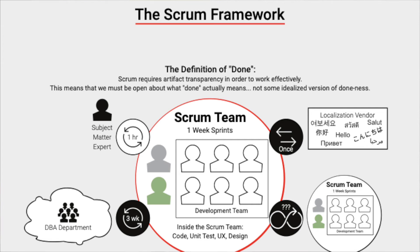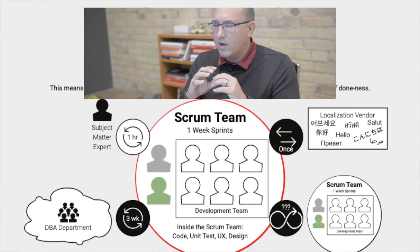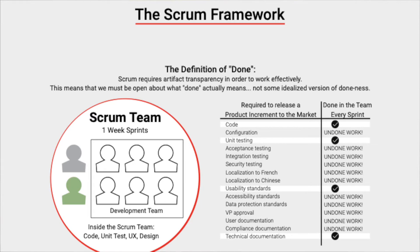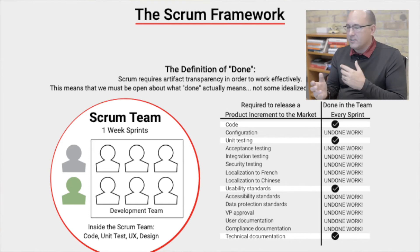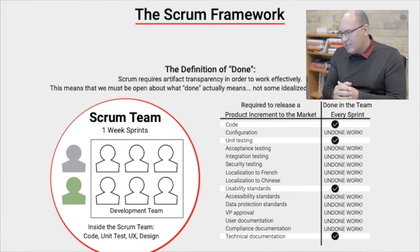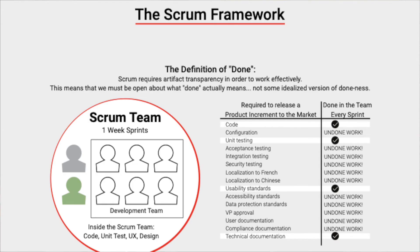So how does this relate to the Definition of Done? The Definition of Done refers to what is within the Scrum team. We can illustrate it as a checklist of all the things required to release a product increment to the market — in software, things like code, configuration, unit testing, acceptance testing, localization, compliance, and documentation. Within the Scrum team, they're doing coding, unit testing, usability standards, and technical documentation, but all the other stuff isn't getting done within the team every sprint. We sometimes call that 'undone' work — it is not part of the Definition of Done.